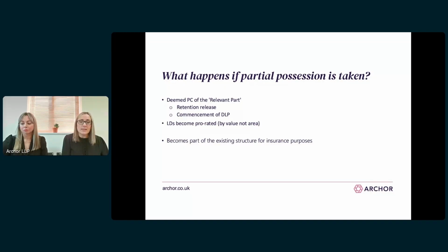And the LDs are prorated by the value of the relevant part, not by the physical square area of the relevant part. So as a result of this, employers are often keen to deny that partial possession has occurred, and therefore disputes can arise. If disputes do arise, they're dealt with subjectively on a case-by-case basis. There are also other practical considerations if partial possession occurs, such as insurances, because the relevant part, which is taken by the employer, becomes part of the existing structure for the purposes of insurance at the point at which possession is taken.